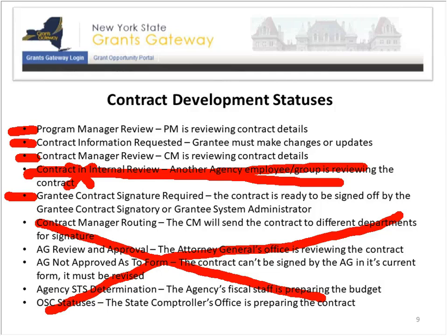Yeah, Jeff? Yeah. It's Susan Mitnick from DOH. Hey, Jeff. I just wanted to mention that you were just discussing the work plan, and even though we have a year 1 and year 2 work plan in the contracts already, if for whatever reason the grantees don't meet their goals or if they've exceeded their goals, that should be mentioned in your quarterly report. But if you're making a major substantive change to your work plan, then we would have to go through an amendment. So you should let the project officer know if there are significant changes in your work plan.